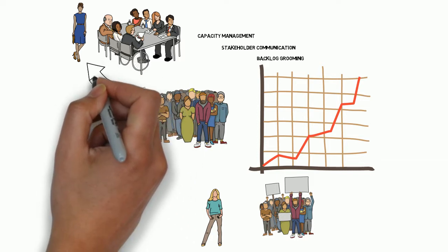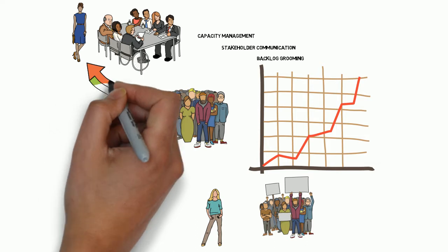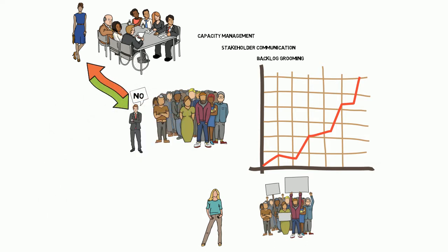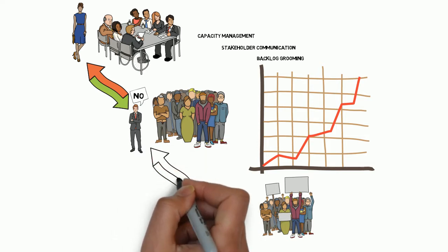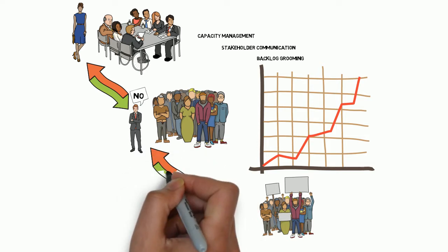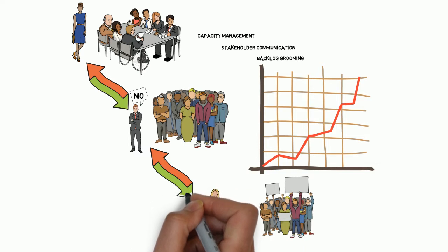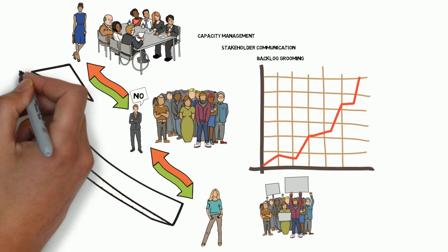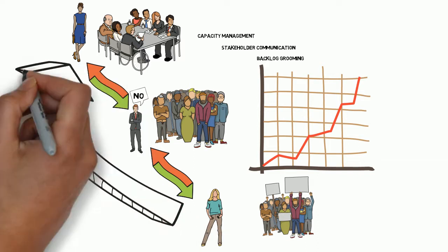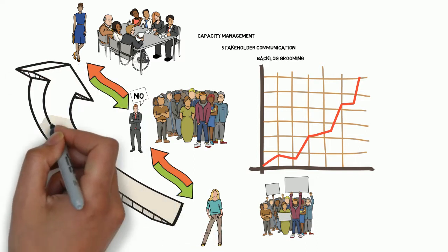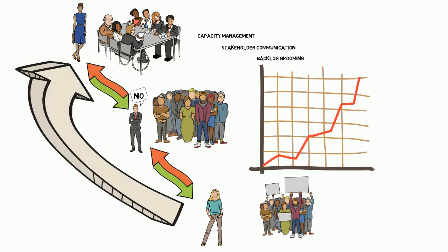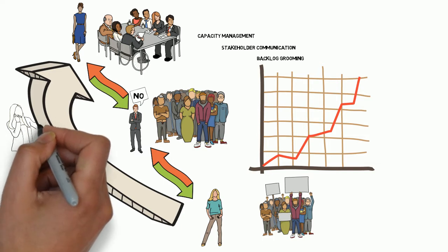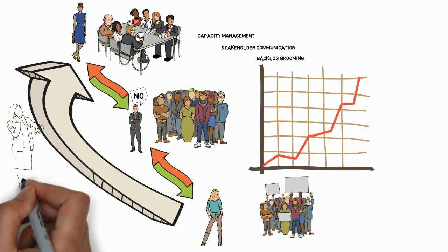In a multiple team scenario, however, the process owners have an additional responsibility to talk to each other. We should organise teams and backlogs to minimise dependencies, but there will always be some dependencies that we can't get rid of. There needs to be some kind of sync between the product owners so that the actions are undertaken in a sensible order and avoid sub-optimising. In larger projects, this may call for a chief process owner role to keep the process owners synchronised.